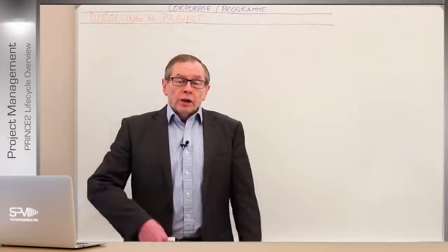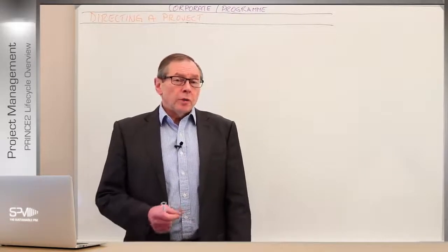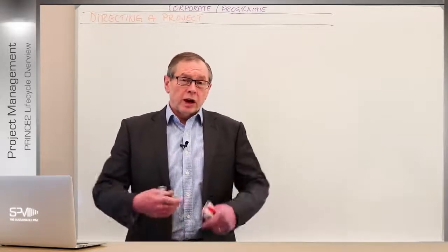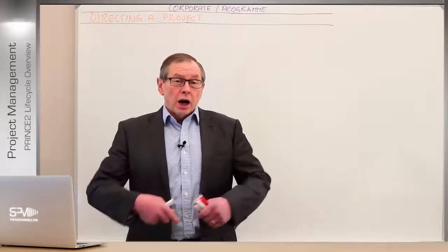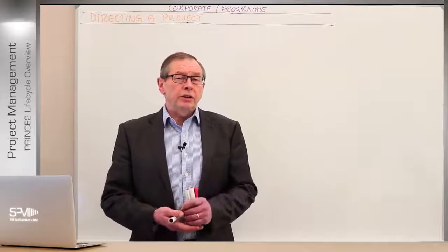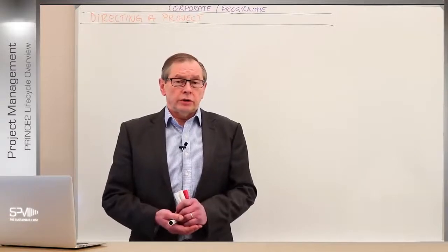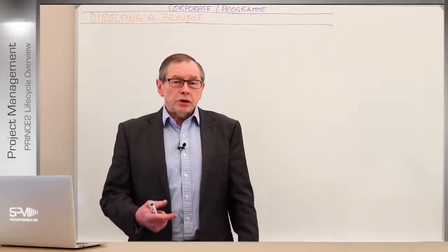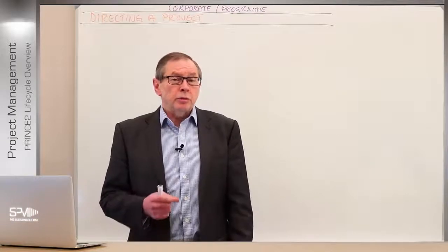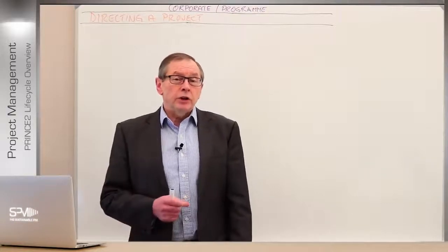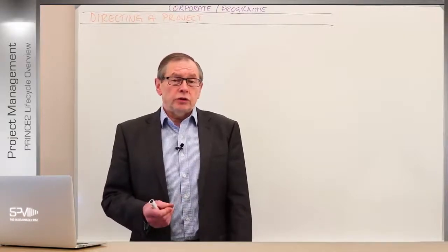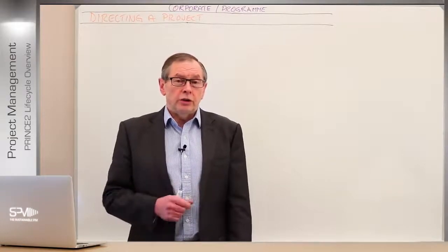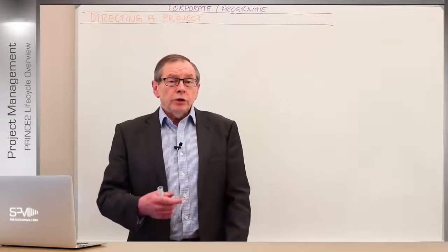Okay, so now what we've done is we've gone through the starting up a project process to get a high-level view of the project, to see whether it's worth funding any further, to give worthwhile viability to the project itself. Once we've established that with the project brief and planned for the initiation stage, we've gone to the board to get authorization to proceed to initiate the project. So now we go to the initiation stage.